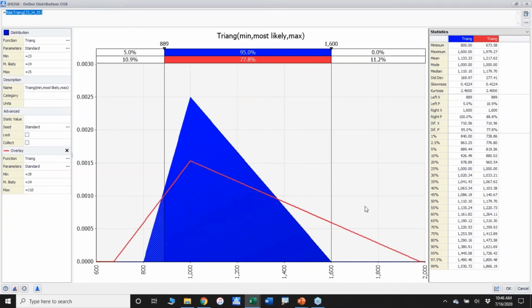That is what the maximum needs to become with the trigarv. Down here, we had a value of 800 as the original minimum. You see that in blue, the original triangular, there's nothing below it, nothing above it. But with the trigarv, which is the red, 3.8% and 11.2%, and sure enough, those two tails add up to 15%. So what the trigarv has done, and let's see if we can compare.